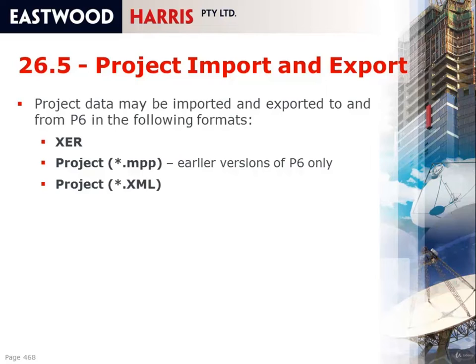Project XML is now the current supported version of Microsoft Project file format that may be imported and exported into P6. So if somebody sends you an MPP file, you need to open it up in Microsoft Project and save it in Project XML file before you can import it into P6 under normal circumstances.